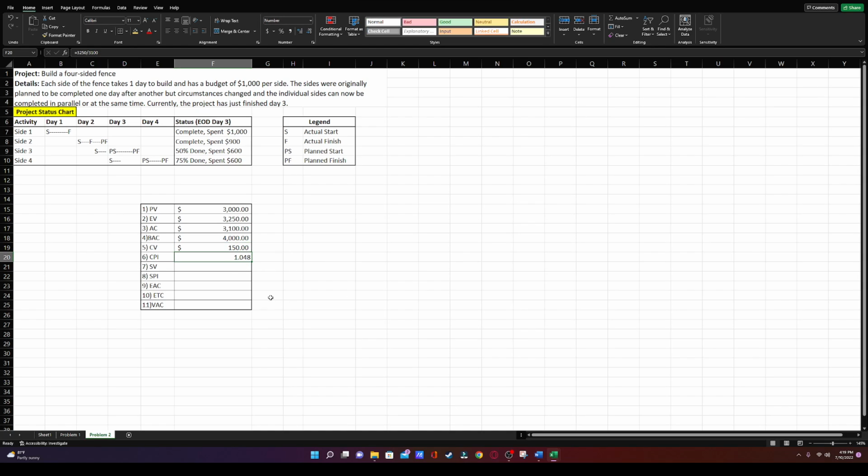The CPI can really just easily tell are we under budget or over budget, right? Without needing to go into the dollar amount, right? So, for instance, if we had 150 here and we said the cost variance is 150, well, I don't necessarily know if that's incredibly good or if that's okay. We're still going to be happy with it, but I don't know the level of impact of being $150 under budget, right?